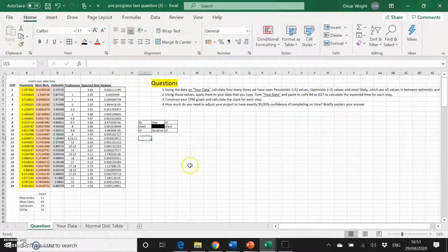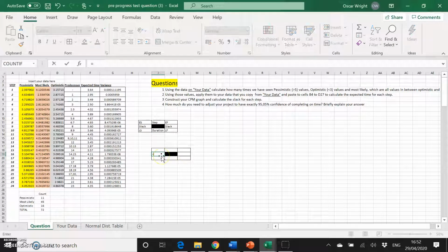So if we take that methodology, we now need to create a box for each of these steps. We're going to do a little box again, same as what we did before. In fact, we're going to move those to a slightly more separate place, so we can start our chart, our graph here. So the early start for stage 1 will be 0. However, we know that the slack is going to be the late start minus the early start.